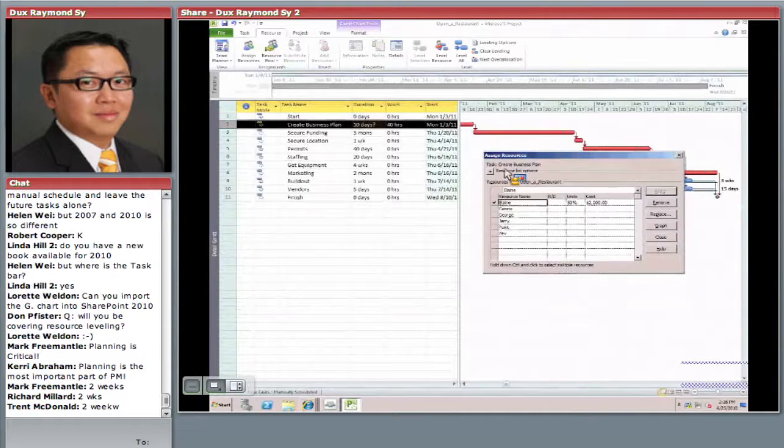Very good. So let's see. I'm going to hit assign. There you go. So 2 weeks or 10 business days. That's right. Now, here is the problem. Again, a lot of people just rely on the duration column and they stick everything in. If earlier I only put 1 week there and I assign Elaine, what do you think will happen? They'll stay at 1 week or 5 days and work will just be 20 hours. So it's very important that people understand what they're estimating for in the resources availability.